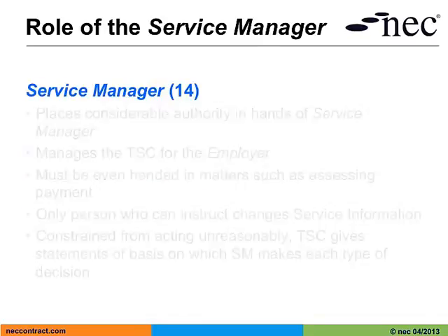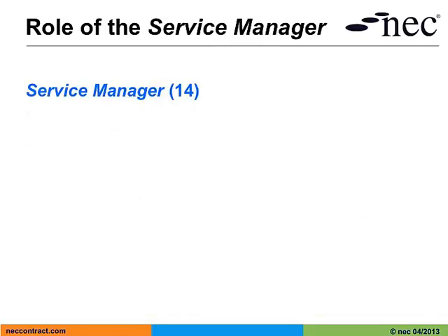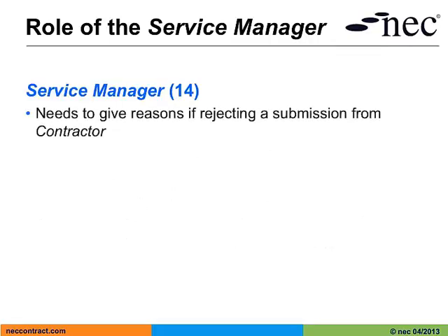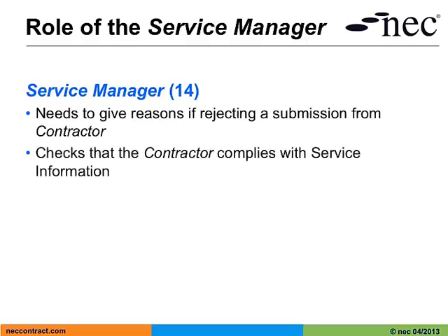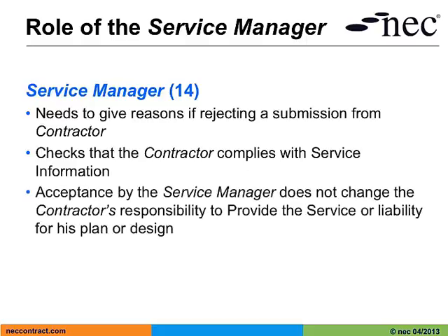If the service manager is going to reject a submission from the contractor, then he needs to give his reasons for doing so. It is also the service manager's responsibility to check that the contractor complies with the service information. The service manager is required to accept or reject a number of submissions from the contractor. By giving his acceptance, the service manager does not change the contractor's responsibility to provide the service or liability for his plan or design. He merely accepts, he does not approve.